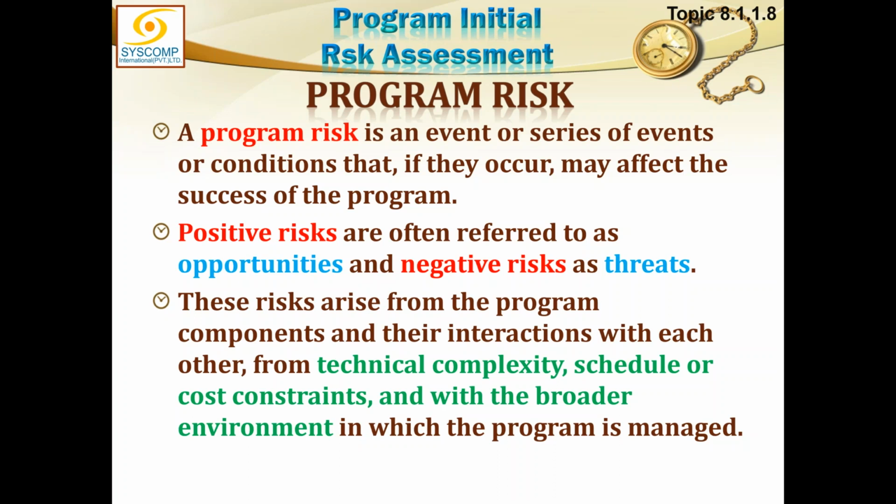And the program manager, along with his team, would be responsible to review their project risks, and out of them, if he feels some of them qualify to be the program risk, he will pick them up, in addition to other program risks which he will identify himself. Does that satisfy you? Yes, that makes sense. Okay.